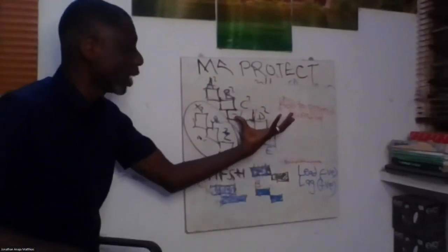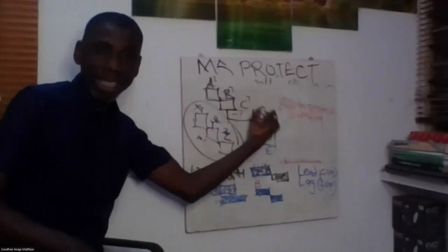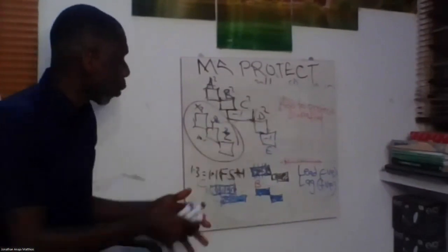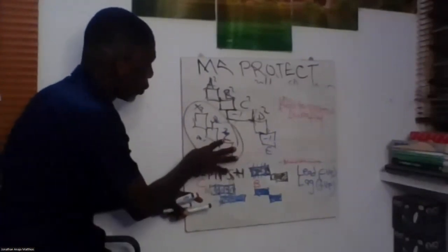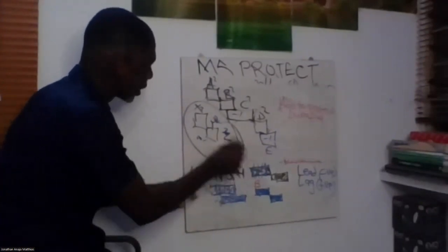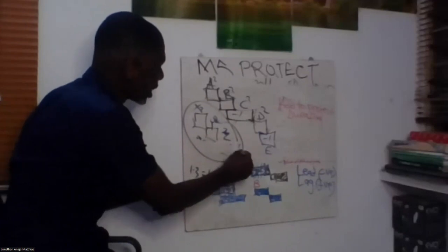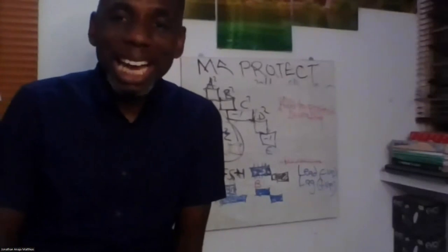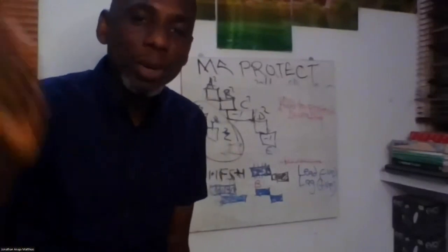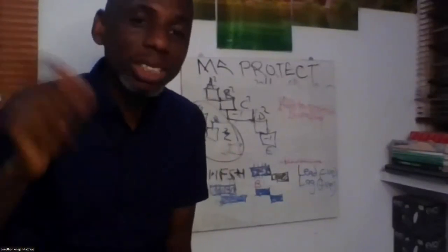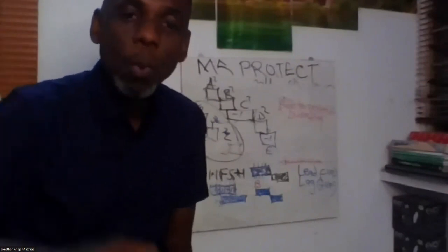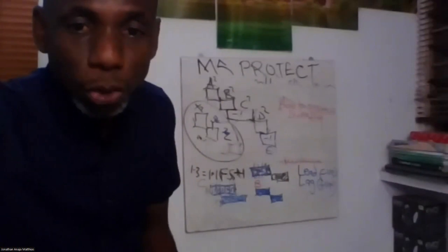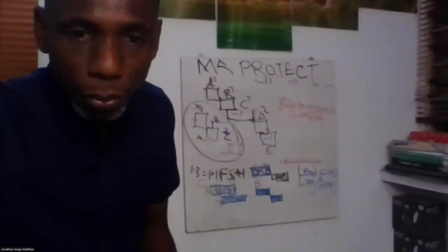I will now not have solved the problem. So I have wasted money to crash and fast track my critical path, only for me to now go and add lag that will now extend. So if I want to do lag between maybe Y and Z, the maximum I can do is what? It's a 2 days lag. 2 days. Now, float says that it is the time unit by which a successor activity can be delayed without affecting the total duration of the project.